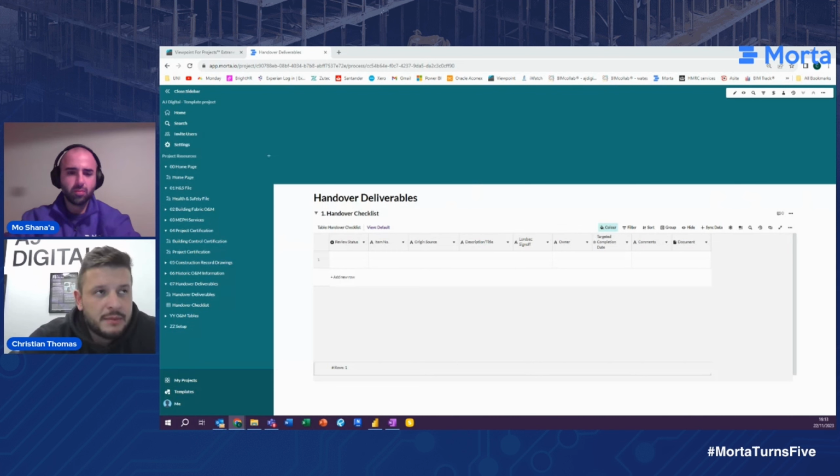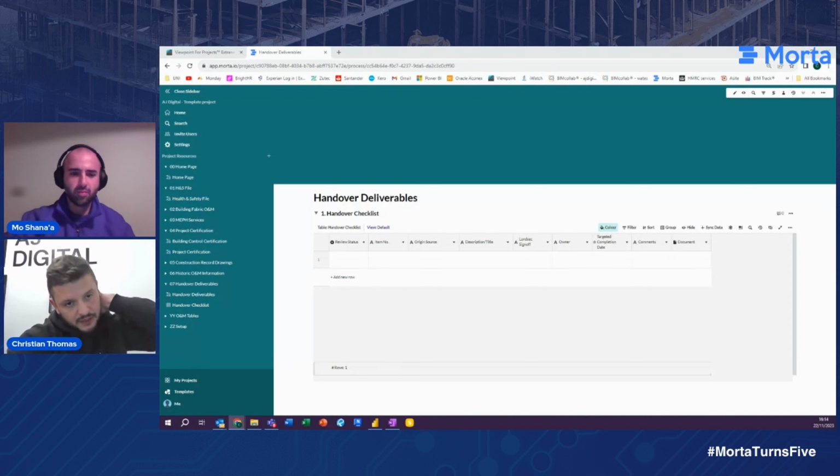And then the utilization, as I mentioned earlier, of the COBie data or Revit links to essentially pre-populate or inform the O&M. I don't see a reason why you couldn't have an O&M that's being populated via the model, provided the model is specified to a certain level of detail, etc., and segregated for CDP packages, so that when you open up your package, you have a list of the products you have supplied that's been pulled from the model. But not only that, based on industry standards for that particular product, are we expecting a warranty? Are we expecting as-built drawings for this particular package? Specific information that is required, but maybe not known to the admin personnel that's been tasked with populating it.